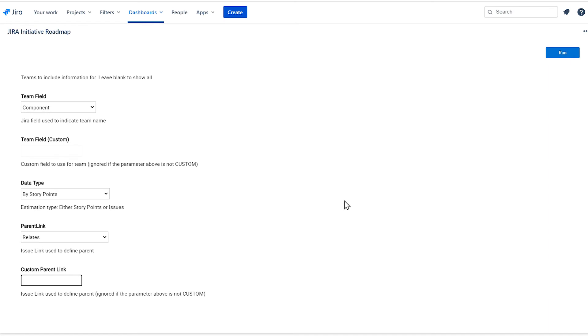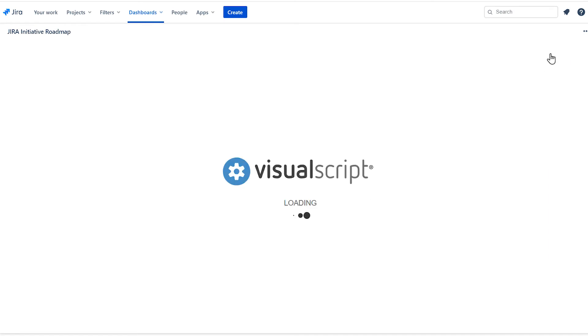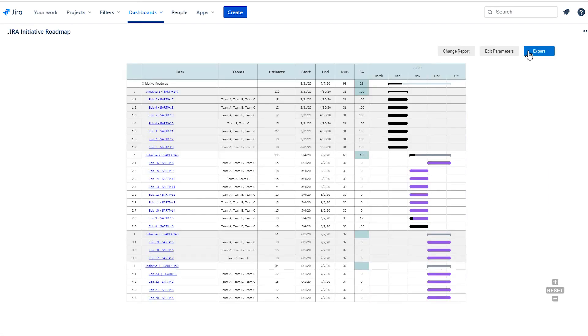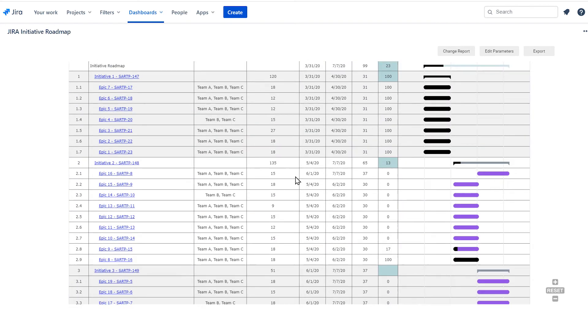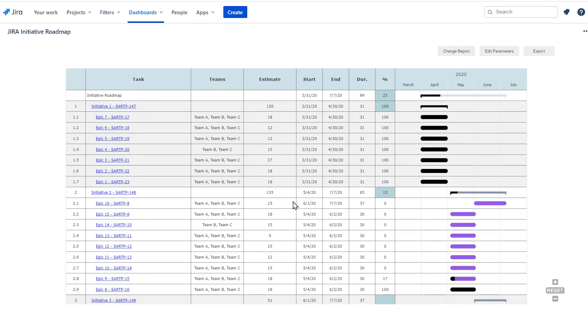Click Run to run the report. The resulting visual is a Gantt chart that shows the relationship between initiatives and epics. At the top level, you'll see your initiatives, followed by their child epics,